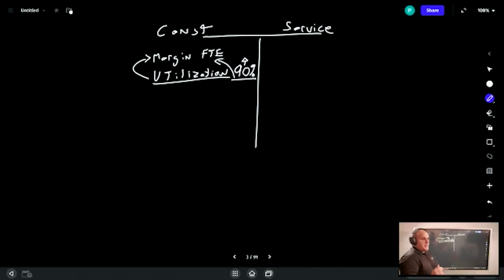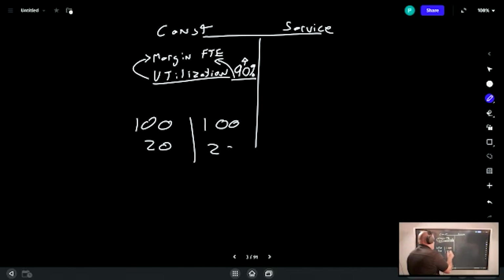Because what will happen is you estimate a project, $100, $20 of it is margin. You execute it at $100 and $20 of that is margin. You get $20 of profit that you can put back into your business. If you execute that at $150, then you have -30 margin.